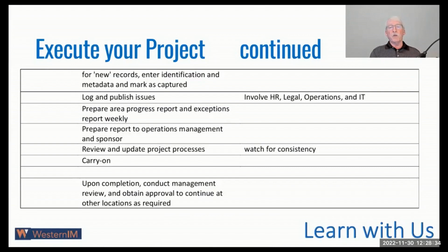Prepare a report to operations management and sponsor, because you want the sponsor to know that everything's been going according to oil. Review and update the project's processes and carry on. And watch for consistency, I think, is very, very important. And upon completion, conduct management review, obtain approval to continue at the other locations as required.